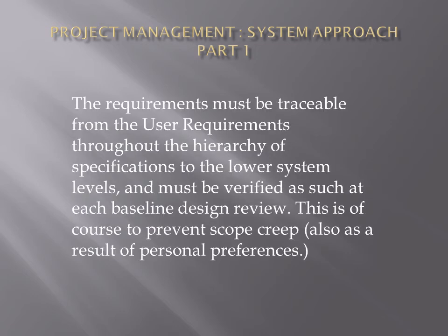The requirements must be traceable from the user requirements throughout the hierarchy of specifications to the lower system levels and must be verified as such at each baseline design review. This is, of course, to prevent scope creep, also as a result of personal preferences.